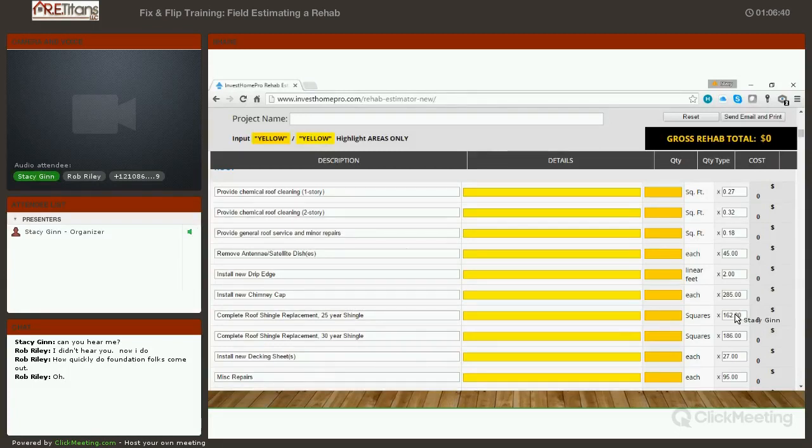And that's something that, on the opposite way, throws new investors off and can keep them from buying good deals: we use investor-focused, sometimes the word is friendly, construction people in our trade. To give you an example, if any of you here in Houston or around Texas have replaced your roof, if you get one of these retail commercial roofing companies to quote your roof, they'll quote you anywhere from $350 to $425 a square.